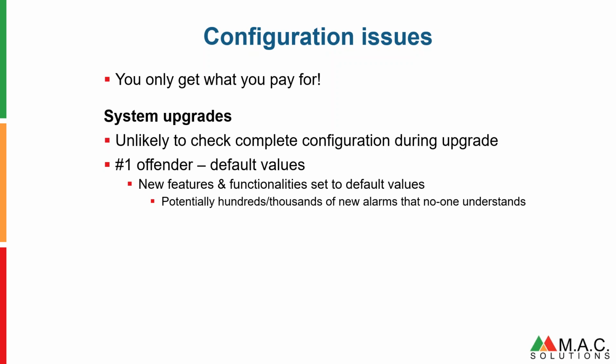In that half hour, all of a sudden you have new features, new functionalities. Is the engineer going to go through 5, 10, 20,000 alarms and set all the parameters appropriately for each alarm? Not in half an hour. You haven't paid for that kind of checking. All you've paid for is someone to put a CD in and upgrade your system.